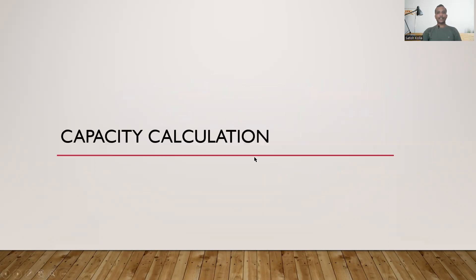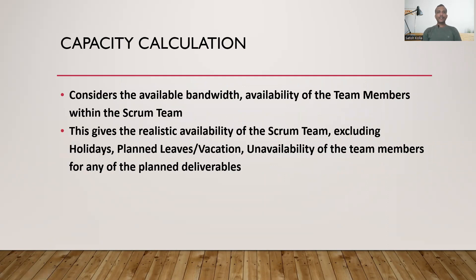First, let's quickly go through the capacity calculation. The capacity calculation considers the available bandwidth or the availability of the team members for that given scrum team. This helps the team to plan the number of stories or the number of story points — how much they can realistically deliver and commit within the given sprint. We need to make sure we exclude holidays, planned vacations, leaves, or any known unavailability of the team during the capacity calculation.